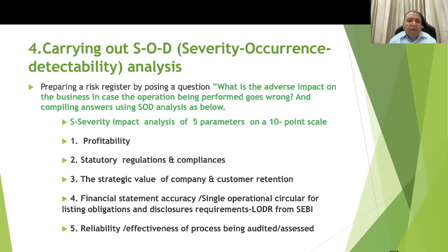Now, carrying out the SOD (severity, occurrence, detectability) analysis. Preparing a risk register: we need to prepare a risk register by posing a question: what is the adverse impact on the business in case the operation being performed goes wrong? And compiling the answer using the SOD analysis.